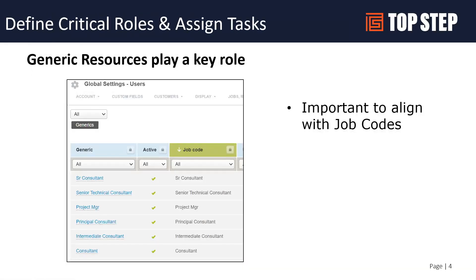When we talk about a resource plan overall, the first thing we discuss with customers is how to define a list of generic resources to use in that process. Generic resources are a key ingredient to a successful resource management plan. One of the key elements of a generic resource is the ability to align them with a job code.